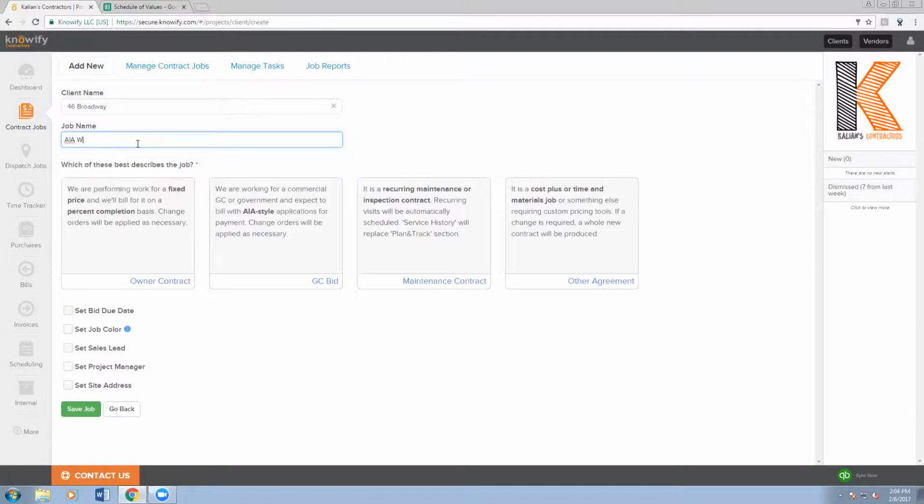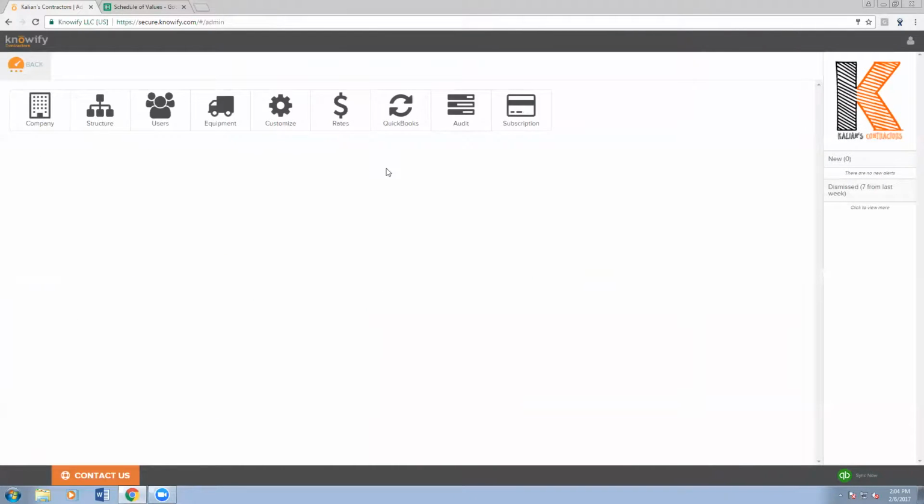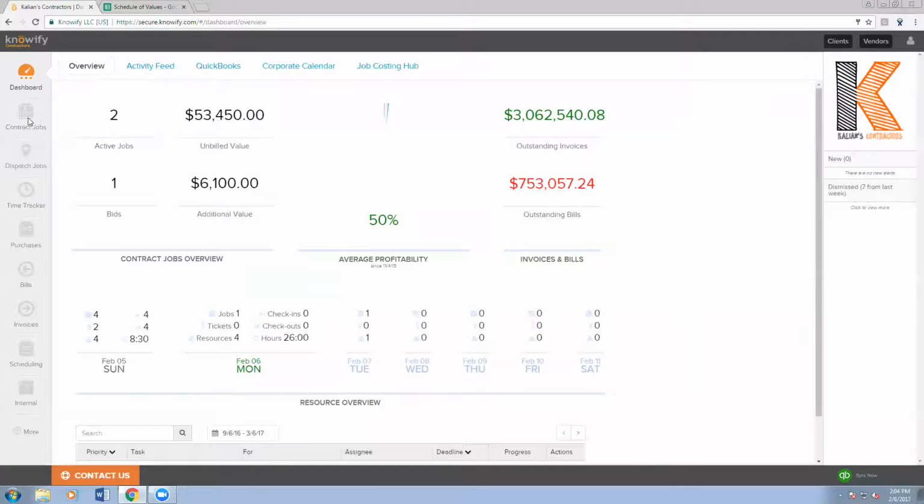my AIA webinar job. Now, one very important thing to note is that you'll need GCBID for AIA invoicing. If you don't have this enabled, it's something that you can enable in your own account. It doesn't need to be done by our customer support team. And just before I even create this job, so you can see where you do that, it's in this Customize section under AIA invoicing. You just flip the switch and you'll have GCBID as an option whenever you're creating a job. So I'm going to go ahead, add a new contract job.